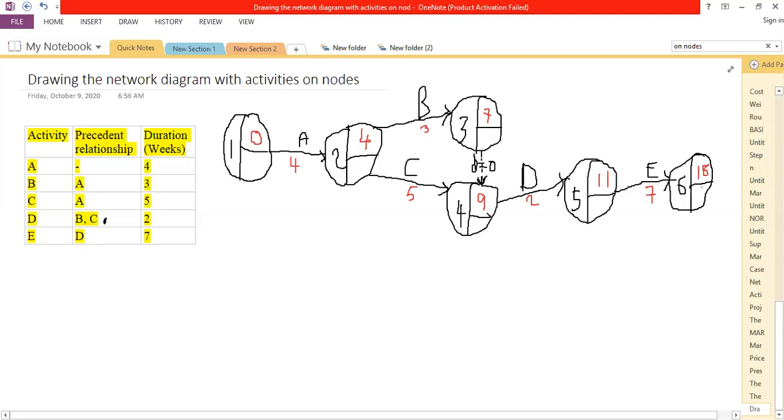18 is the project duration, the earliest that we can finish, and so the latest that we can finish that activity to mark the end of the event, marking the end of the project. We go backward using the backward pass. In this case, we are taking the smallest cumulative value, moving from an event. So if we reach a point of comparison, we need to pick the smallest figure or the smaller value. So we are subtracting this time. 18 minus 7, this will give us 11.